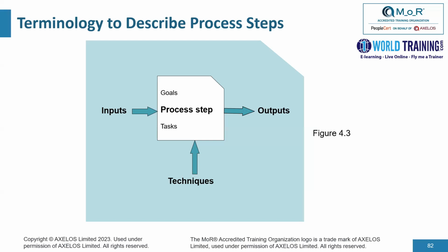For example, when you think about the identification process, when we identify the risks, we need to look into inputs such as the organization facts or documents, policy documents, and environment. Then we carry out a few tasks: we conduct workshops, we use brainstorming techniques, questionnaires, and risk breakdown structures. The ultimate result is a well-articulated set of risks that go into a risk register.